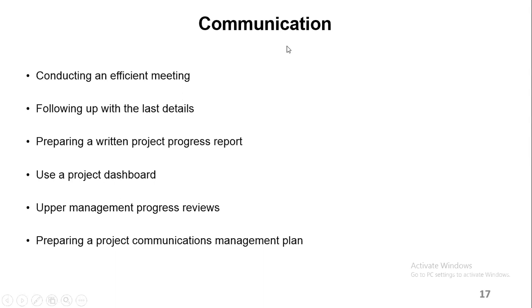So there's a lot about communication in your slides also. You need to conduct an efficient meeting. You should not make the meeting too long, so people might not even choose to go there next time. Keep it short, simple, straightforward. And you need to follow up on details, maybe on things that you requested previously. You need to prepare a progress report. This will go to the big bosses. And you need to have a project dashboard. This is having key performance indicators for the project progress.